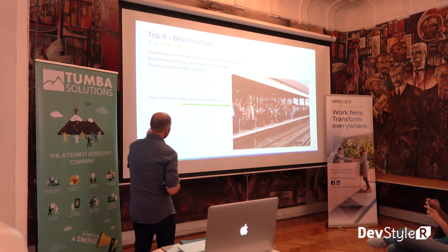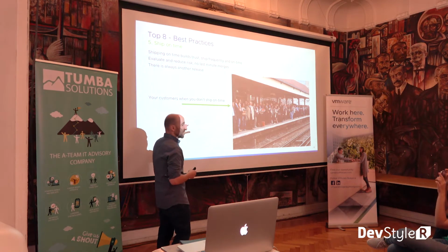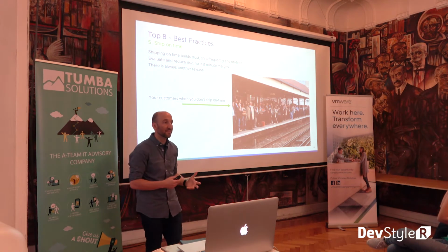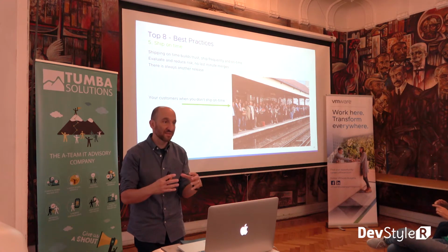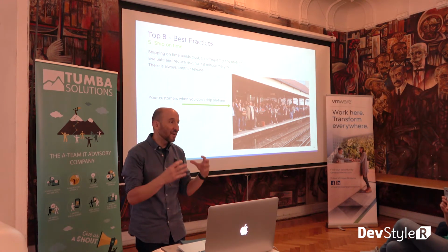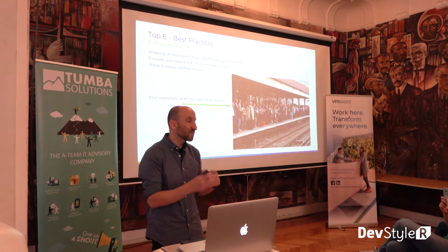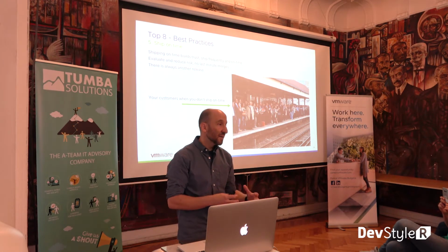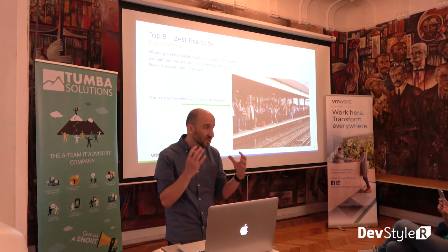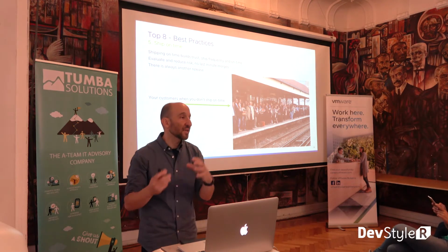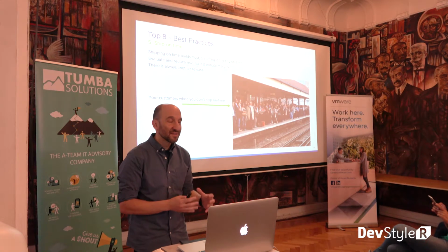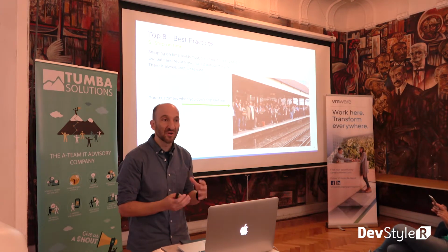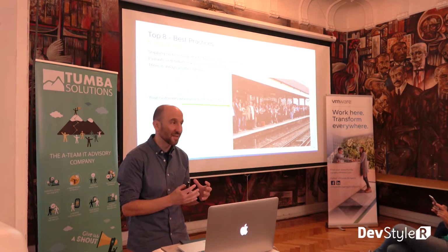Same thing. If you want to build trust with your customers, you have to ship on time, right? And the only way you're going to ship on time is to minimize risk, right? Think about how much risk is in those pull requests, how much risk is in the features that you're doing. Try to minimize it, try to test around it, and ship with what you have that you're confident in, right? And have your stuff ready early. The best way to ship on time is to be early. Do your homework early and have the builds ready early. And that's what we do.